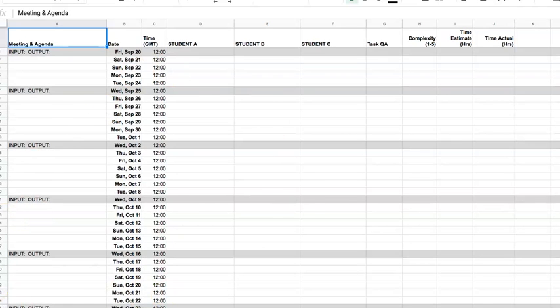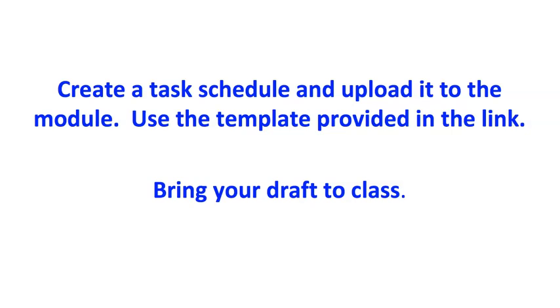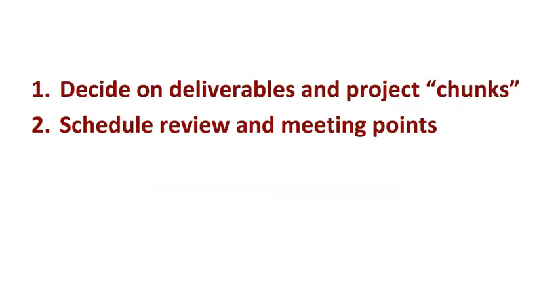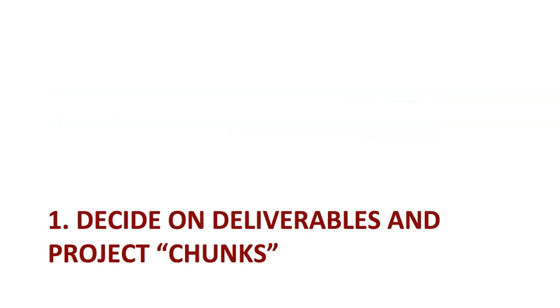Once you're done, go ahead and upload it to the link and then also bring a draft to class so you can discuss it and deliberate it with your peers. In this video, we'll teach you two strategies to help you construct a task schedule. The first is deciding on deliverables and project chunks by looking at the course prompt and also a sample if you have one. And then the second one is scheduling review and meeting points throughout your task schedule.